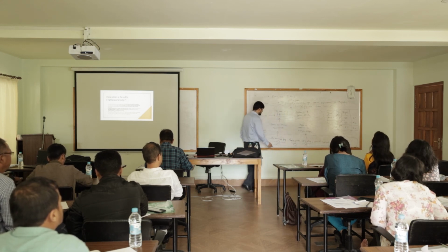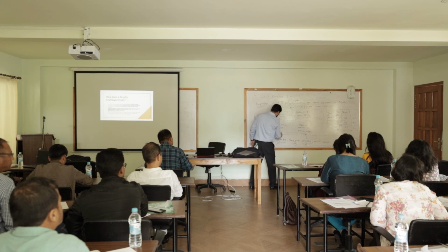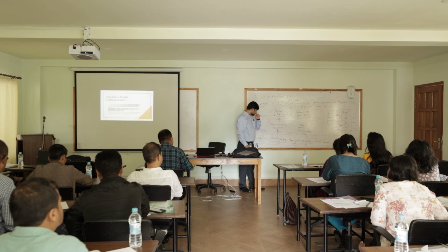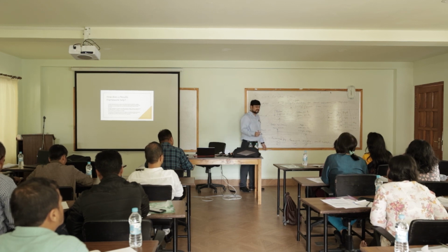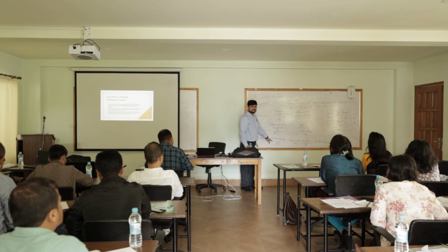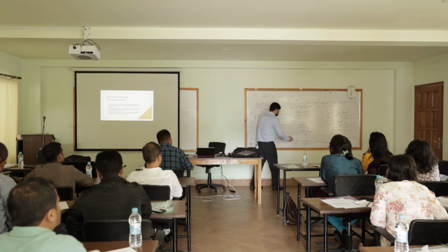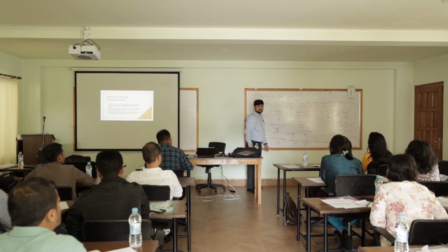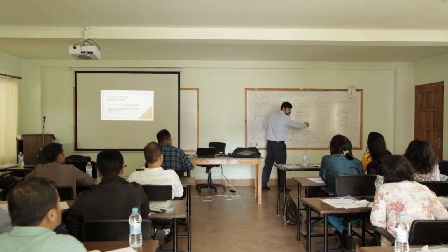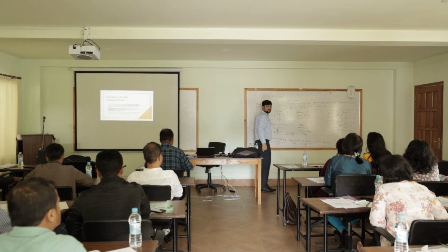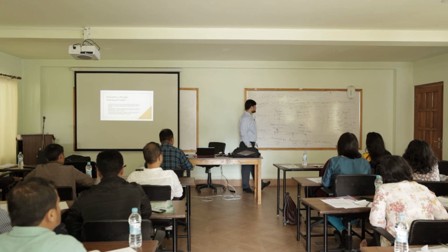it would happen that maybe counseling and awareness are both contributing to getting more people aware about this, right? So usually what happens is either it is a one-to-one matching, where each of these activities translates into one output, or mostly it is like this, that 2 or 3 come together to form one output. So the numbers will keep on decreasing as you move up the ladder. That's why I said it's going to be a pyramid sort of structure.